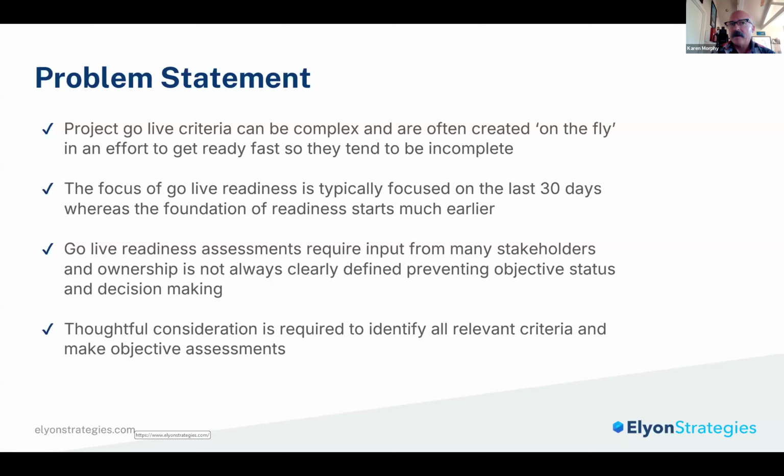Maybe you have HIPAA or PCI or GDPR or SOX controls that you want to validate are all in compliance with the new system, and you have an independent audit completed. So you can see how very quickly, if you start to dig deep on your project, you can come up with some pretty detailed but potentially very important criteria for assessing whether you're ready to go live.